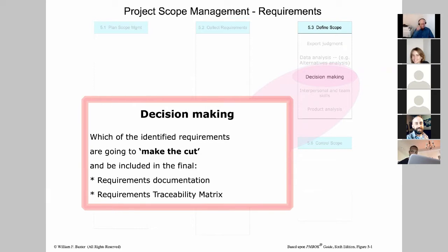And this is what's typically meant by traditional project management, where the cost of change is high and new requirements that surface late in the game are much more difficult to accommodate, or perhaps even impossible to accommodate. And so it's really important to establish all those requirements up front as much as possible. But this whole line of thought falls apart. Some situations, some projects just don't lend themselves to this approach, and we need some alternate approaches.